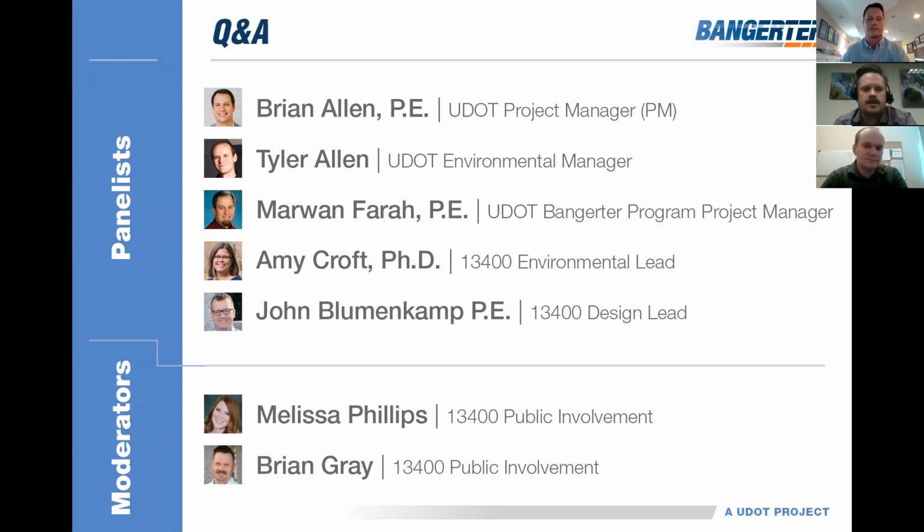Okay, so the next one is for Marwan. Will the 126th project be complete before 134th begins? And if you could perhaps just kind of explain how the Bangerter projects are scheduled out and how they're determined. For sure, 126 and an interchange on Bangerter will be done before, as Brian mentioned, the construction for the 134 is not scheduled to start till 2023. Right now, the current Bangerter 3 projects, 126, 104 South, and 62nd South will be completed by the end of the year.